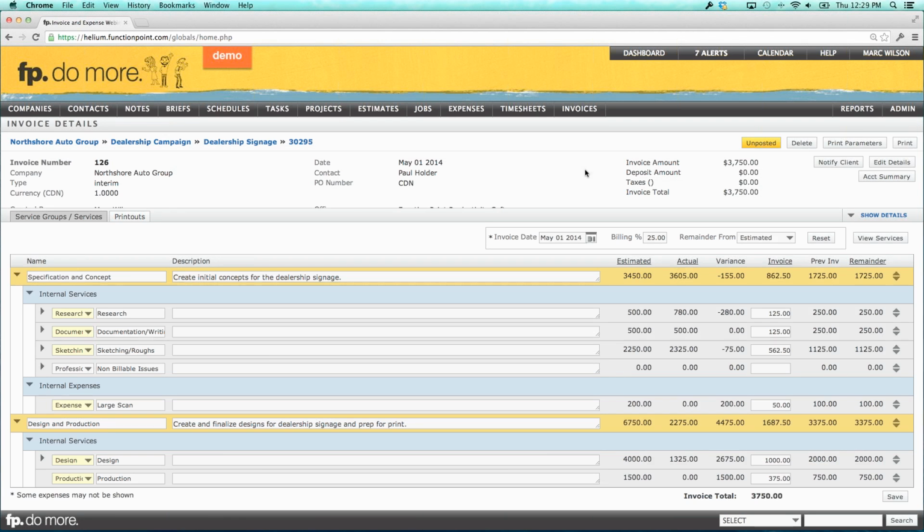The clients and yourselves might have different types of agreements, and they might say, well, we realize that you guys need to send us an invoice for this, but we'll give you some leeway on your next job, but right now I really need you to only be billing me maybe 15% of this, or anything like that. If you need to go in and make a change based on whatever you need to do, you could adjust the billing percentage, 15%, click on estimate, and change the value to 15% of our estimate.